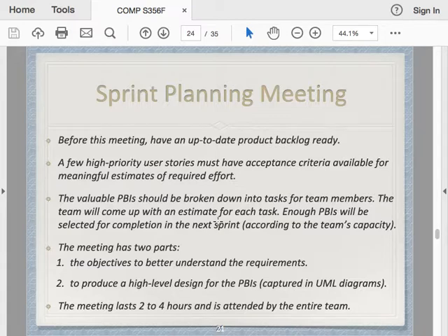The person at the high end can explain why they think it's difficult and takes more time. And then the person who gives a small estimate will say why they think it's easy. This sort of discussion may help your teammates to understand the amount of work better.